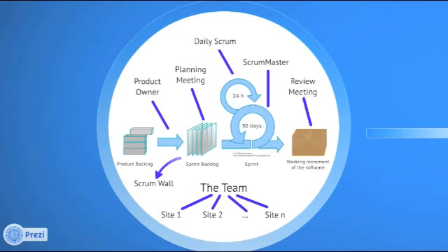At the beginning of a sprint, the product owner selects from the product backlog a number of stories that they want developed during the sprint, and that becomes the sprint backlog. And the developers decide who's doing what. They just kind of, by consensus among themselves, decide who is going to develop each story. Then the stories are put in a kind of matrix structure on a board called the Scrum Wall or Sprint Backlog that shows who's doing what and what's done and what hasn't been done yet. And that stays up on a wall near the development team for the rest of the sprint.